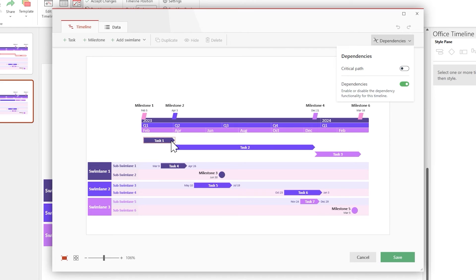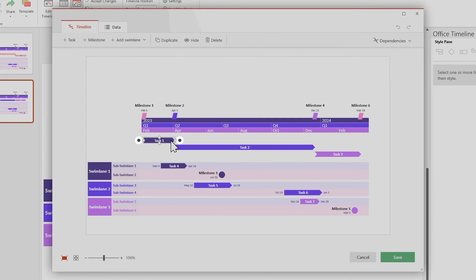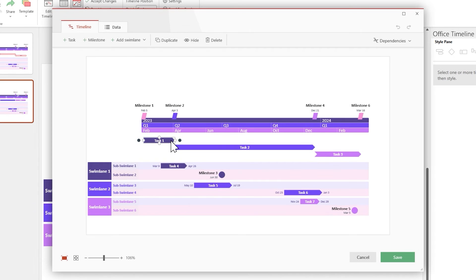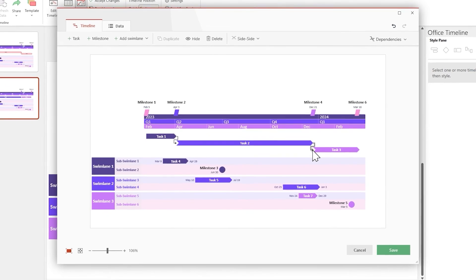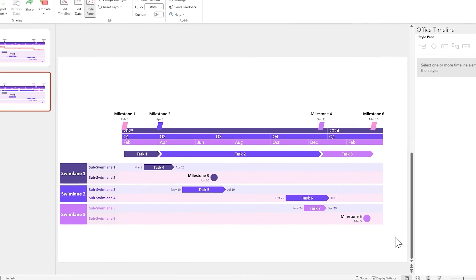Now, if you select a task or milestone, you'll see two dark circles. You can click on any of them and drag to another task or milestone to link them together. Once you're done creating all the connections, click on Save.